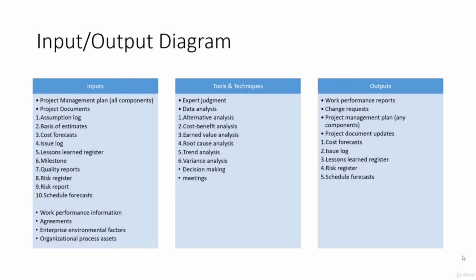So all of that project schedule is part of your milestone dates, and it is used as input in tracking, because it's very important to compare these dates and make sure that we stay on track. If we are already late, and we were expected to deliver, let's say, our BRD, then we need to know how we are going to compensate for the lost time. So milestones are very, very important for project tracking. It's all about dates.